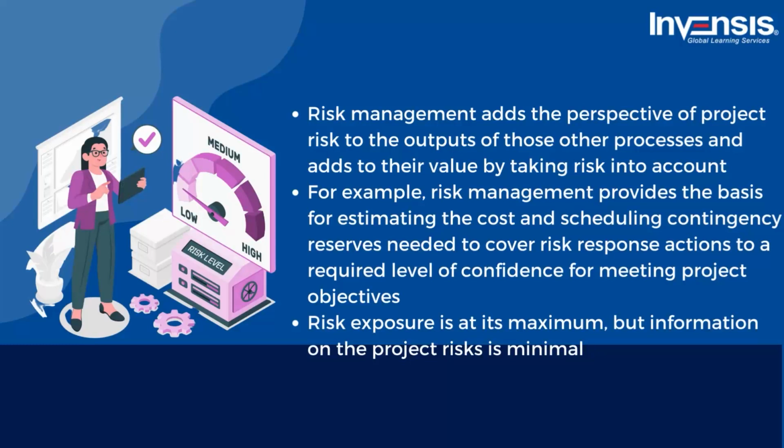For example, risk management provides the basis for estimating the cost and scheduling contingency reserves needed to cover risk response actions to a required level of confidence for meeting project objectives. In some situations, there is a paradox about project risk that affects projects in the initial stages of a project. Risk exposure is at its maximum, but information on the project risks is minimal.